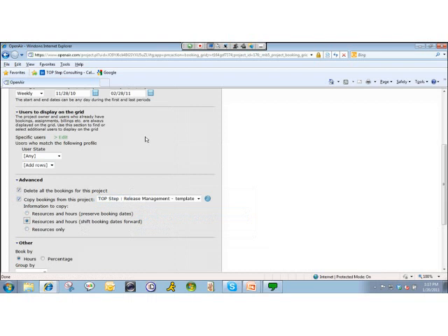This allows you to actually set up a template with generics on your template projects to say your typical team would require a project manager, senior consultant, technical architect, and QA support, for example. Set those up. Those get copied over into the project manager's project. They can put the hours per week or month of who they need, save it. All those resource bookings are created in the booking module, and then you can use the simple swap team substitution to change those resources. Okay?